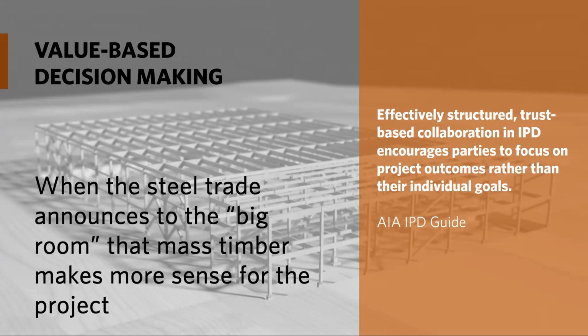After a thorough cost estimate and considering all the implications, the team realized it's actually cheaper and more valuable to use mass timber. It was an interesting breakthrough moment when the steel trade, as part of the multi-party agreement, actually announced it to the entire big room and effectively left the project.